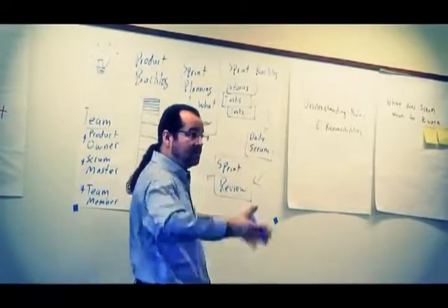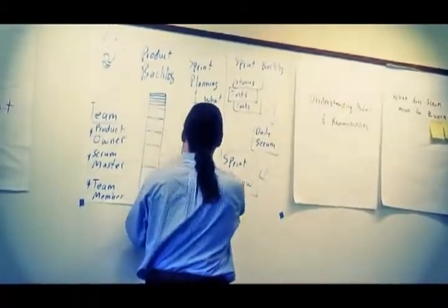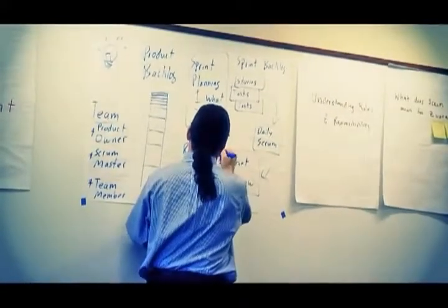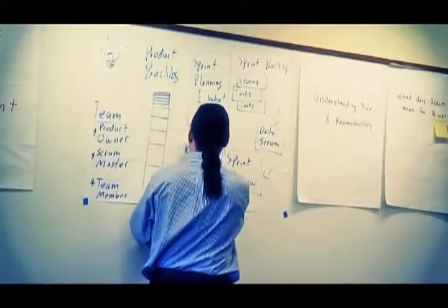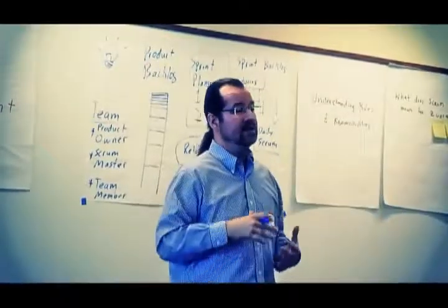And we keep all the stakeholders out of the room, and we have the private end of the sprint. The retrospective. Retrospective is a time just for the team to look back and figure out, hey, what did we learn as a team this sprint?